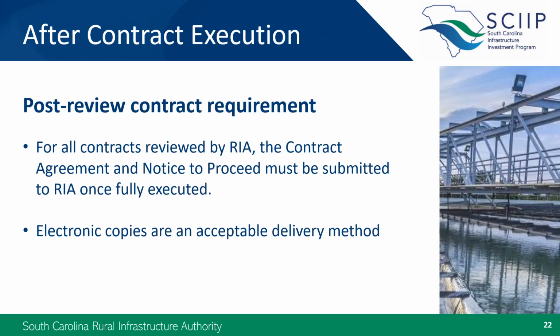One last important thing concerning contracts I'd like to mention. For SCIIP contracts reviewed by RIA, the notice to proceed, as well as the contract agreement, must be submitted to RIA once they have been fully executed. These must be received prior to the first draw request. So please provide these fully executed documents electronically and as soon as possible.